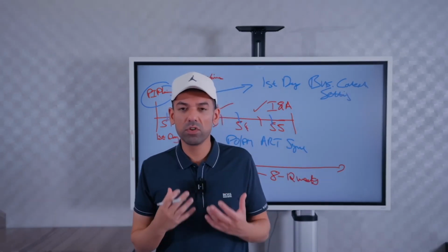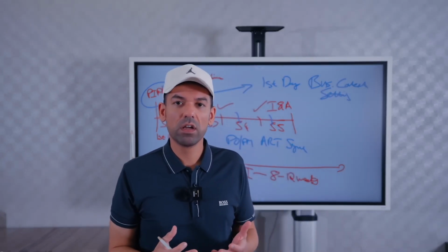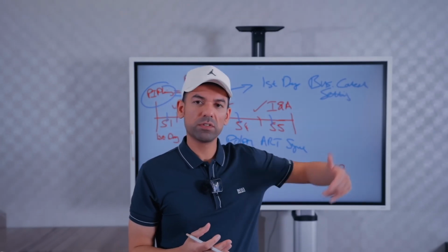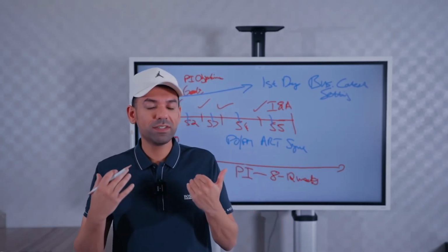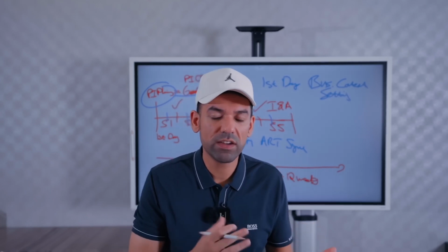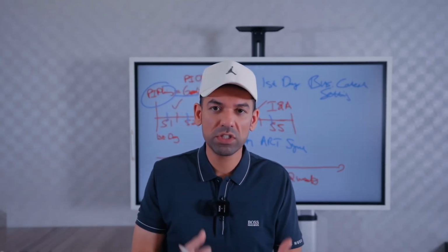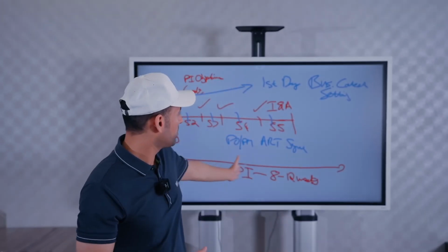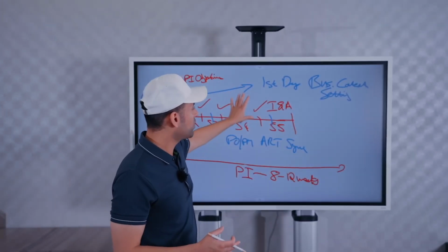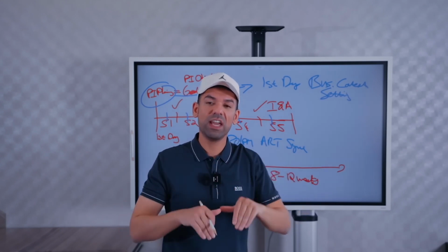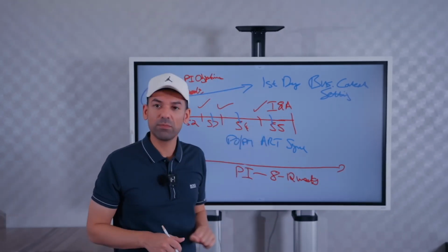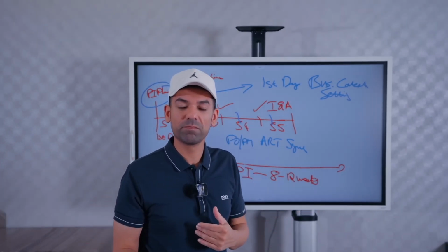In this business context setting, in the first 2 hours of the day, all the business stakeholders actually give presentations. They present what we need to achieve in this upcoming PI. So the stakeholders are actually in the session where the planning is taking place for the next PI.